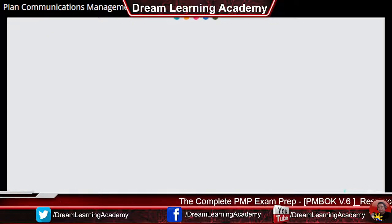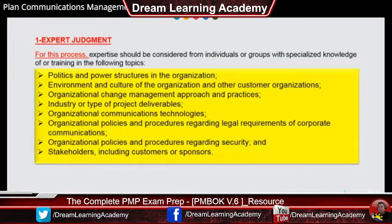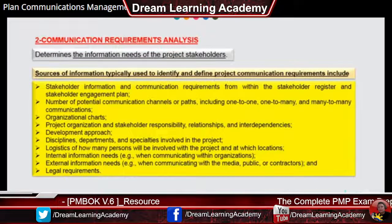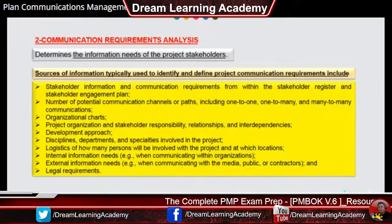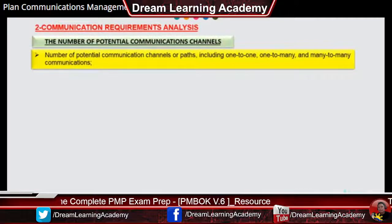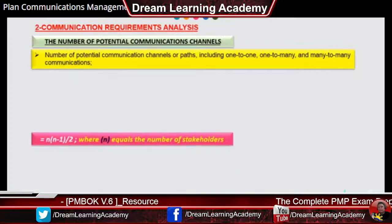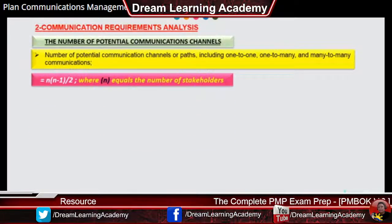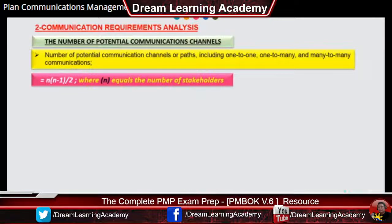The tools and techniques for creating a communications management plan include expert judgment, where experts have specialized knowledge in working out an effective communications management plan. The second tool is communications requirements analysis, which obtains a detailed description of individual stakeholders and their communications needs. To appreciate the number of potential communications channels, you can use the formula n multiplied by (n minus 1) divided by 2, where n equals the number of stakeholders including yourself as project manager.